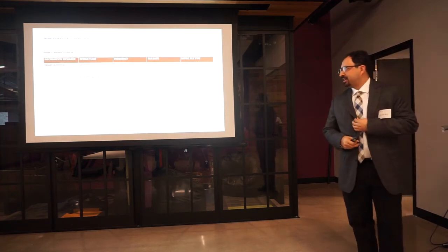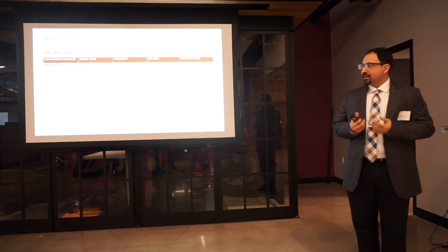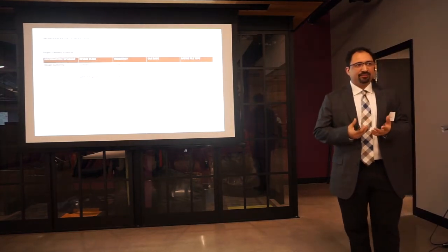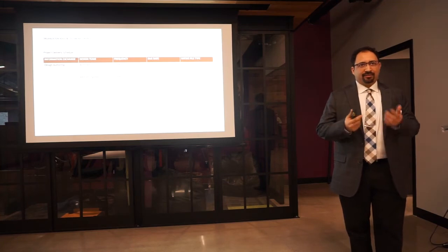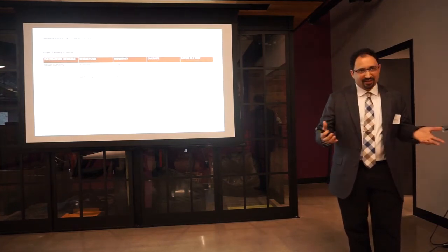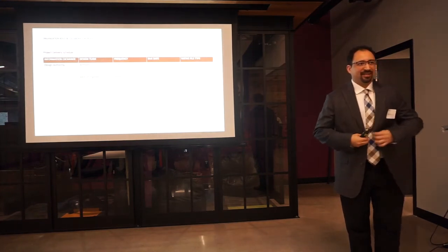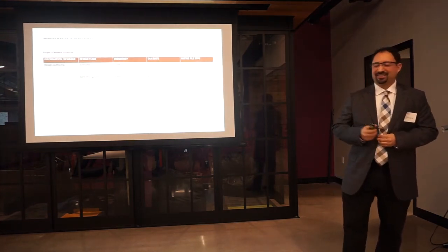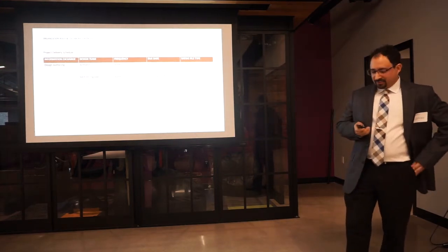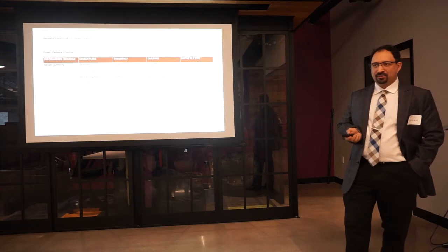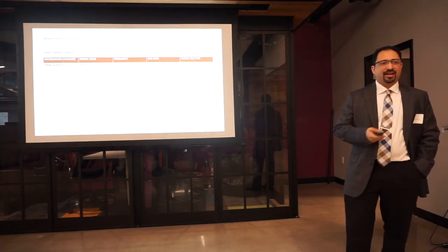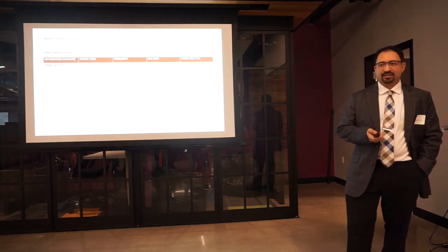In there, in that same document, we set up the project delivery schedule. In this case, because we wanted to keep the client up to date, the client requested that the documents be delivered to them on a weekly basis at 5 p.m. Friday. Although most nights it'd probably be like 6, 7, 8, depends on the submission. But there's always a weekly upload to our shared FTP site in order to provide everyone backgrounds for their project as well.